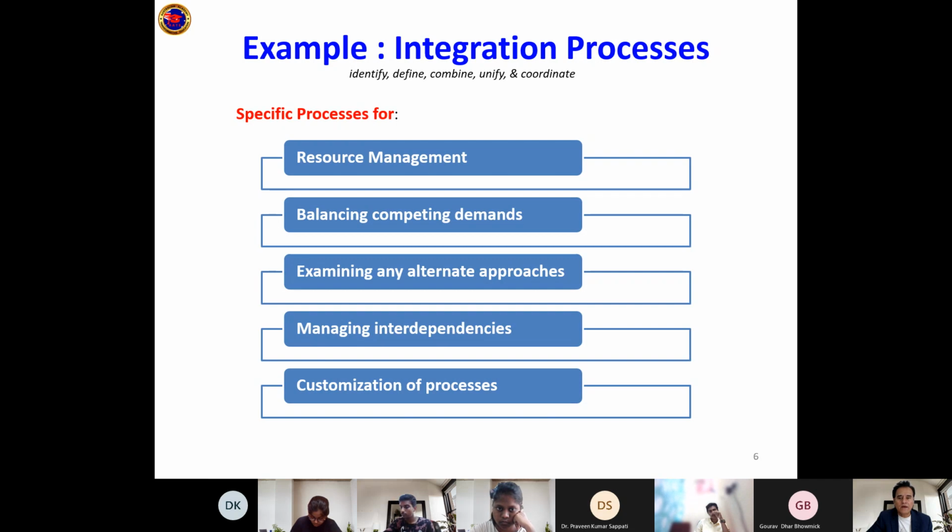So you will plan 3 hours each day or maybe 5 hours for 3 days. Okay. So those 15 hours then are known, signed by their boss, and you will structure it so that on Wednesday, these 3 hours I need, on Thursday, those 3 hours I need. So that's how you balance the competing demands. So that's your job. Okay.